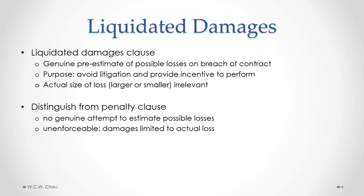The actual size of the actual loss compared to the liquidated amount is not really relevant. However, a liquidated damages clause may sometimes be viewed as a penalty clause where a court feels the amount is not a genuine attempt to estimate possible actual losses from a breach. If it is viewed as a penalty clause, the court would say that the liquidated damages clause is unenforceable — in other words, not valid.